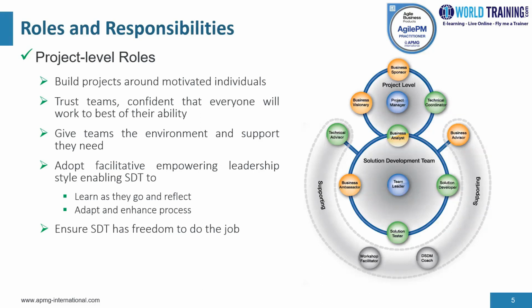The business sponsor provides the overall strategic direction and controls the funding and budget for the project. The business visionary, on the other hand, and the technical coordinator, they hold the business and the technical visions respectively for the project. The project manager ensures that the project funds are used effectively to create the envisaged solution within the agreed timelines. Now, the business analyst is intentionally positioned as a part of the project level, as well as a part of the solution development team.